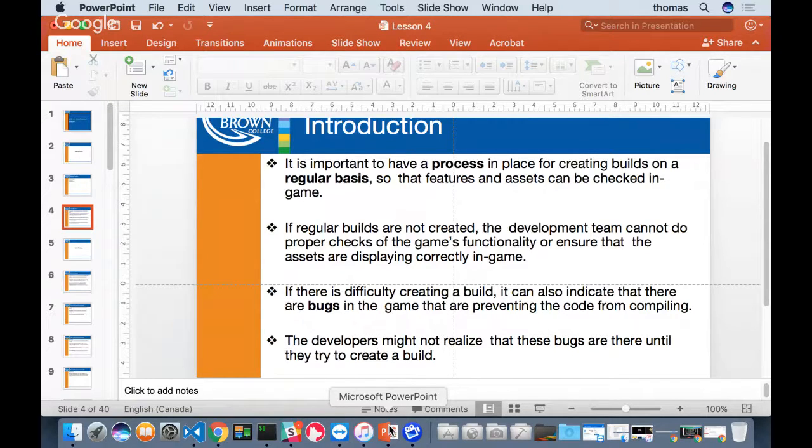Sometimes you might have to do 2 builds. And what I mean by a build or an iteration is think about things we're going to add. So maybe I have features that I want to add. I might also identify things like bugs, right? Defects that come up. Guys, this is going to be on your exam. The defects are something that the testers, the QA people, are going to have to identify. And then we have to squash the bugs, right? We have to fix those bugs in the next iteration or next build. We need tools to do this, right? And of course, we're going to use GitHub.